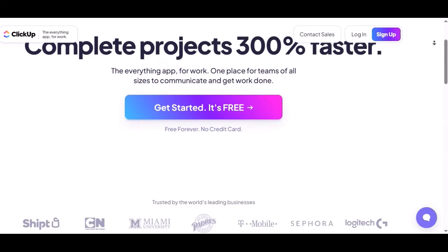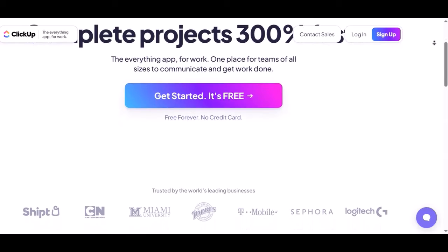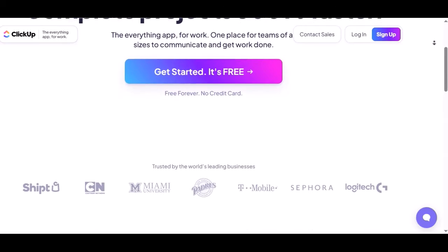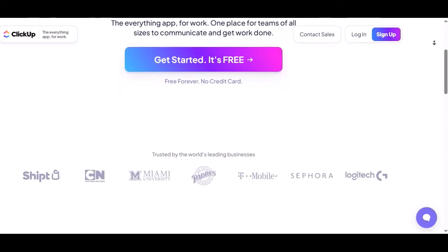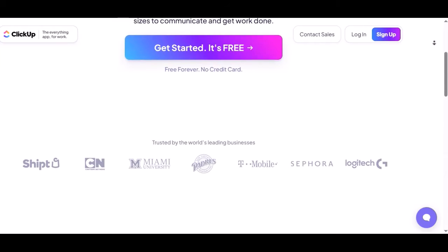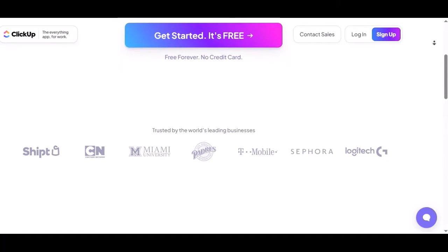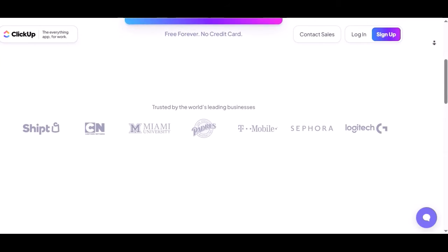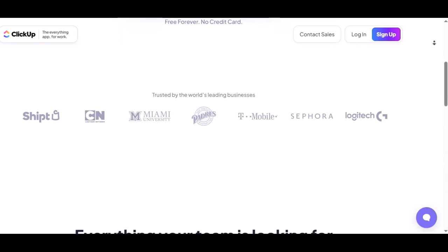You'll see a drop-down for each of your Excel columns, and you'll select the matching ClickUp field, e.g., your project name Excel column maps to task name in ClickUp if each row is a task, or a custom field if it's a project property. ClickUp is smart and will often auto-suggest mappings, but always review them carefully.